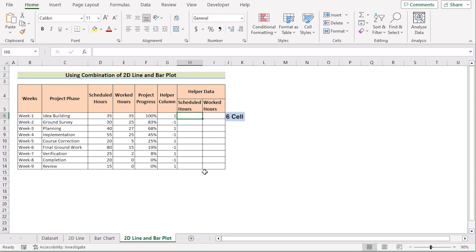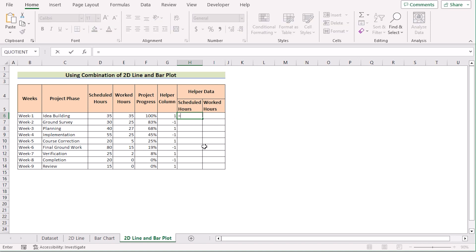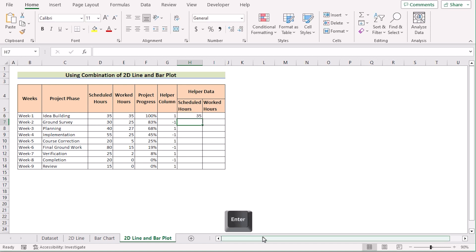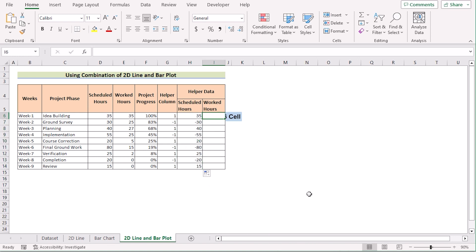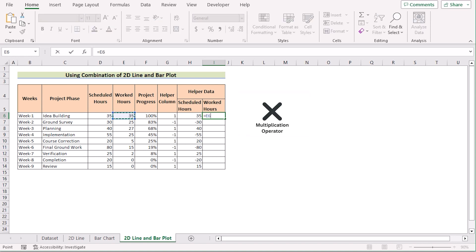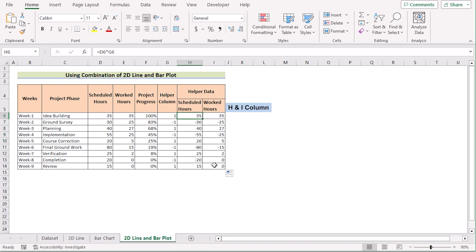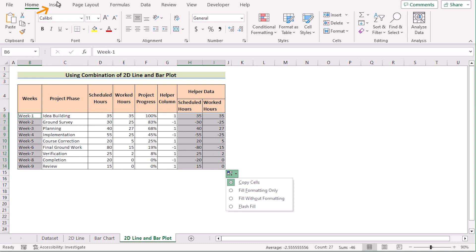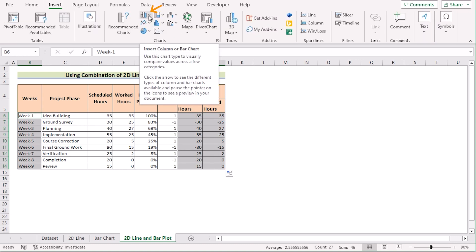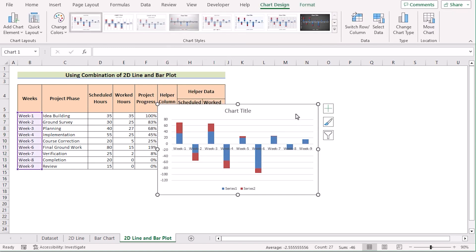Go to cell H6 and enter a formula: multiply the D6 cell by the helper column value, then press Enter. Use the fill handle to apply the formula to all cells. Then go to cell I6, multiply E6 by the helper column G6, press Enter, and use the fill handle for the rest. Now select columns H and I, press Control, and then select the week column. Go to the Insert tab, go to Insert Column or Bar Chart, select Stacked Column, and you have got the perfect result.